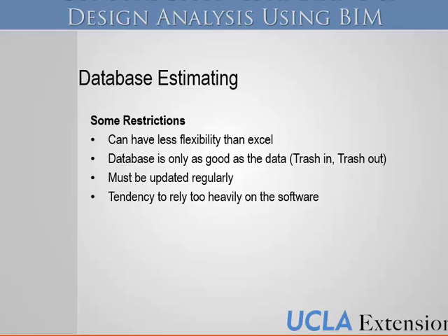They would need the knowledge of the market and prices, right? Yeah. So ideally you'd be updating your prices based off of historical data, and then kind of doing some forecasting. That individual would need to know how to query all that data, so they need to be savvy on some kind of software to do that. And then being able to look at market trends and say, okay, concrete prices are going up, so everything related to concrete needs to go up 5% for this year.